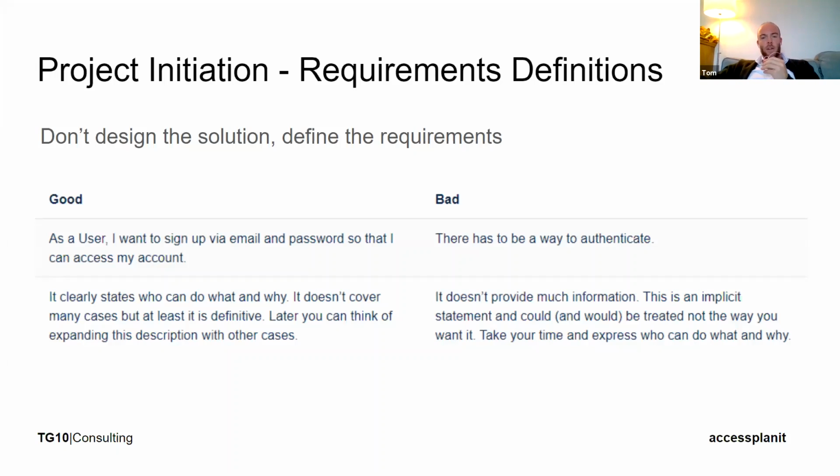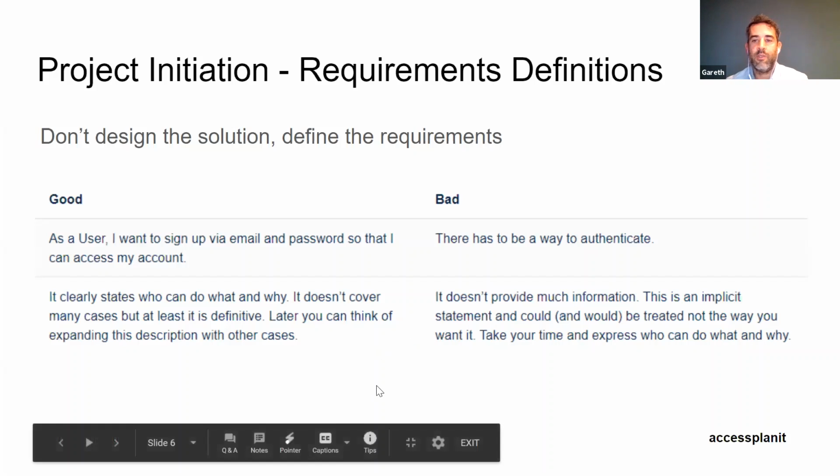Is it worth talking about how we group those requirements together, both from the type of requirement as well as how we prioritize? Yeah, I suppose you've got functional requirements and non-functional requirements, and people get a bit confused about those sometimes, but ultimately non-functionals are just trying to talk about things like availability, performance, that kind of thing.